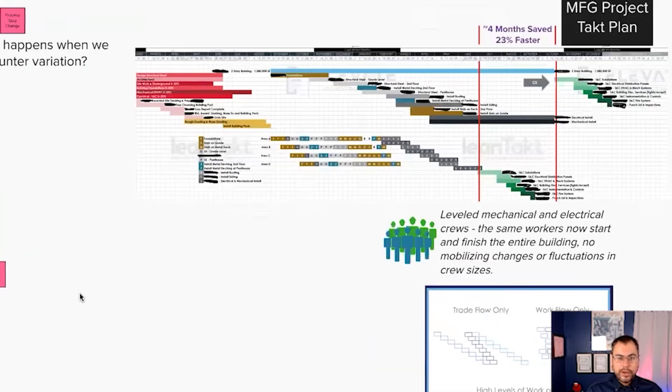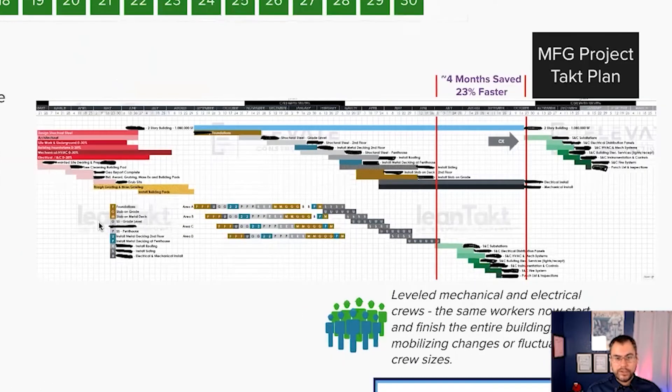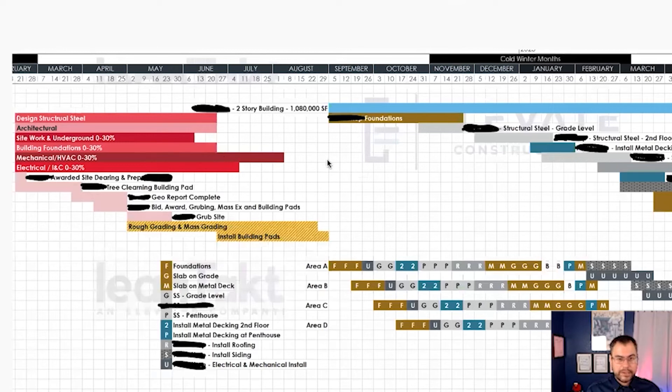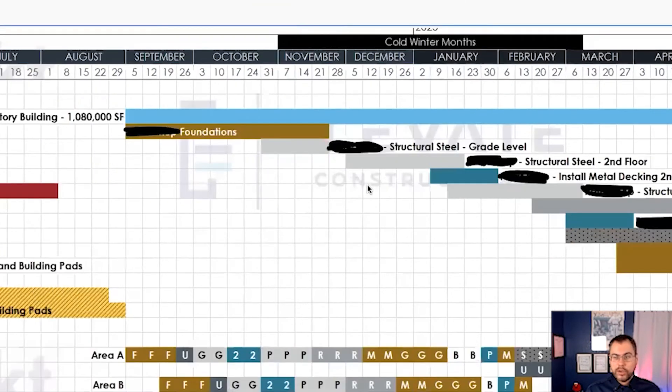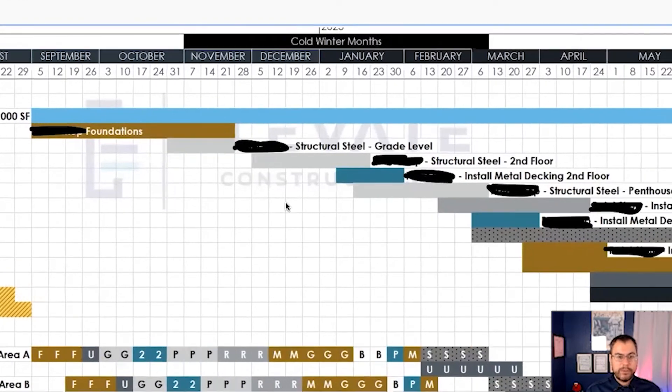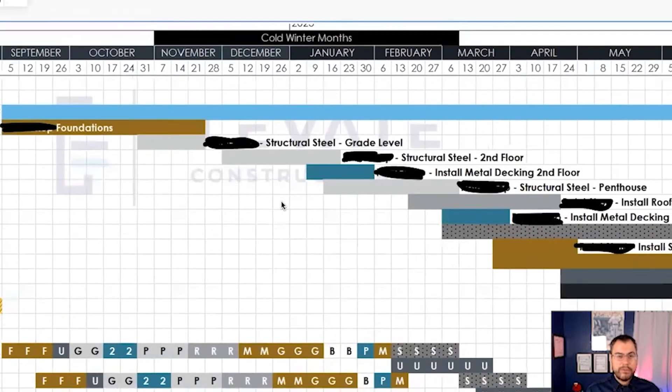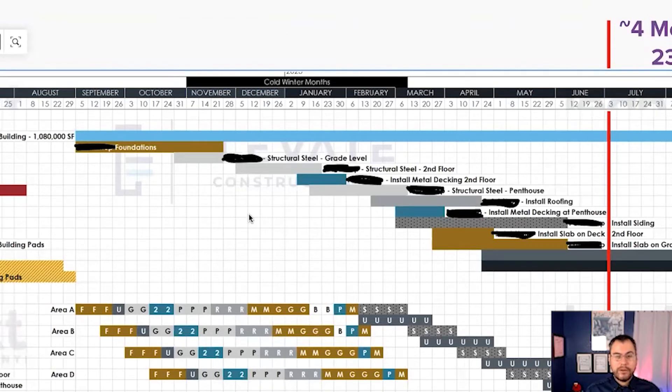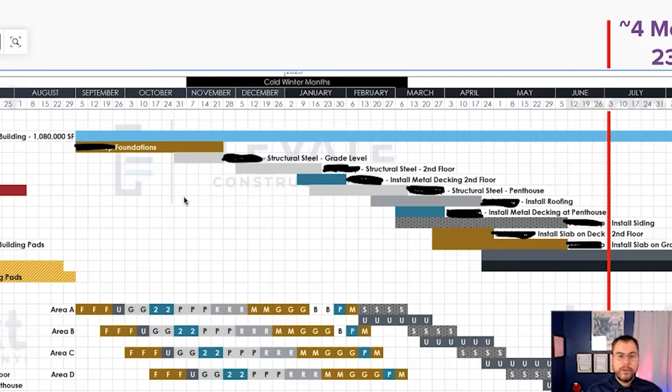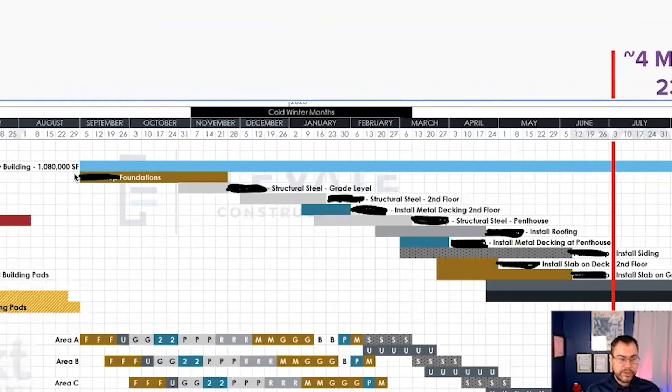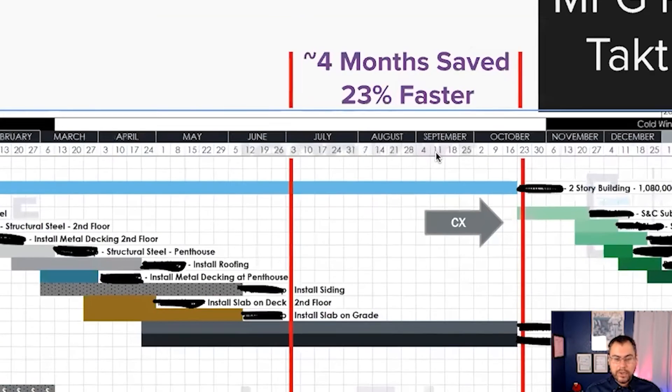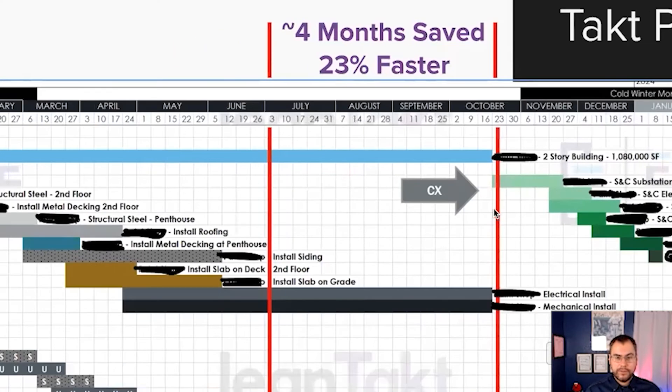What about a real example? Here's a manufacturing construction project that we implement to tack. On the left, we've got some engineering activities. We've got the time on the right. I took the critical path method schedule and put it into this Excel spreadsheet and it took me about one day. And this is multiple buildings on a very large site. This building right here is over 1 million square feet and I'm just showcasing one area. This is the typical critical path method schedule. I put a bar on the top just to show the total construction time in blue.